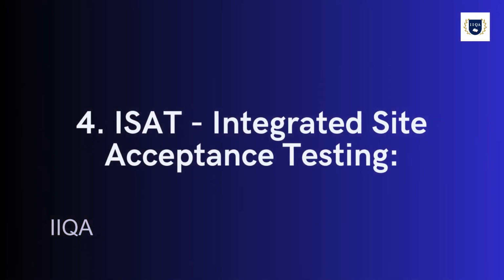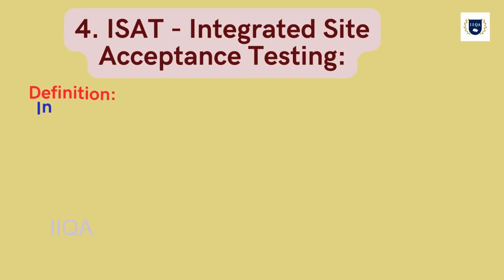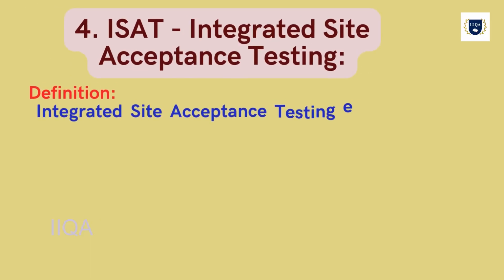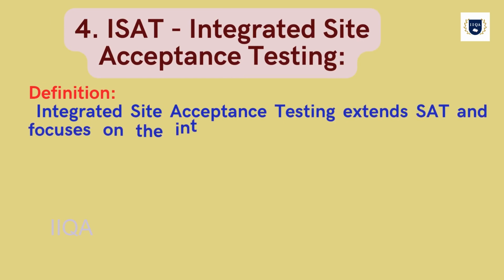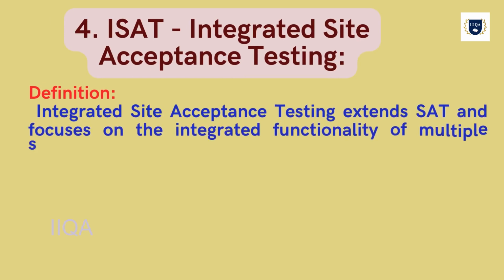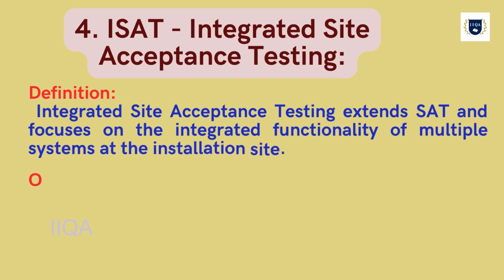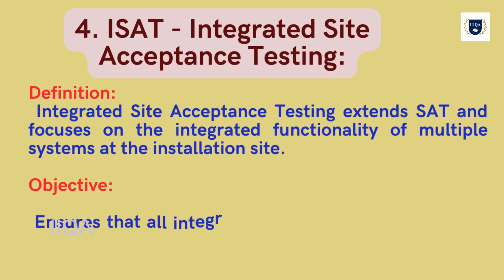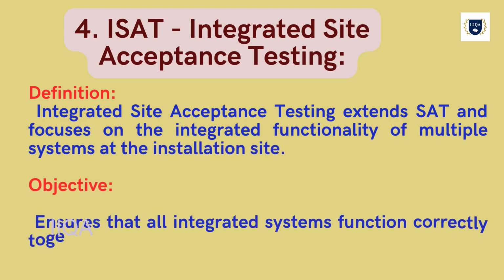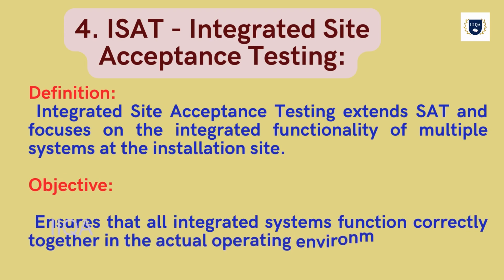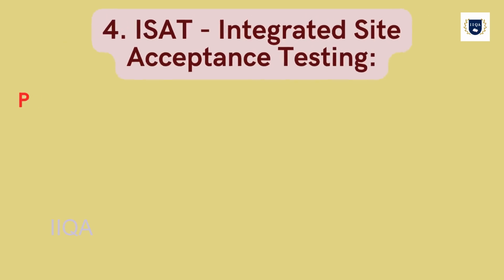4. ISAT, Integrated Site Acceptance Testing. Definition. Integrated Site Acceptance Testing extends SAT and focuses on the integrated functionality of multiple systems at the installation site. Objective. Ensures that all integrated systems function correctly together in the actual operating environment.